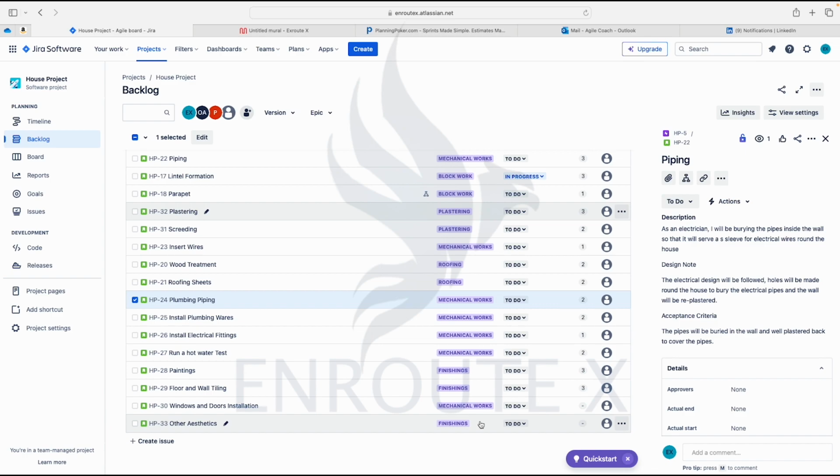So what happens when a story is more than 5 days? Simple practice in Scrum, then you decompose that story further. You break that story into smaller bits. The bigger the story, the more difficult to follow through, the more difficult to have transparency in. So as a practice, a smart Scrum Master wants to encourage the developers in particular to break stories down into smaller bits so that we can follow through with those stories.